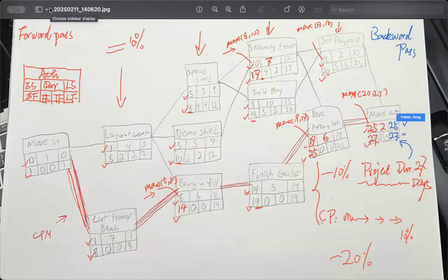This one is close to it, right? And this one is close to it. So you have 25 here, and then 25 -3, you have 23. So these are correct. And you have 25 here, and the -6, you get a 19. Those are good. So we're moving back into here, and you have 19, 19, 14.